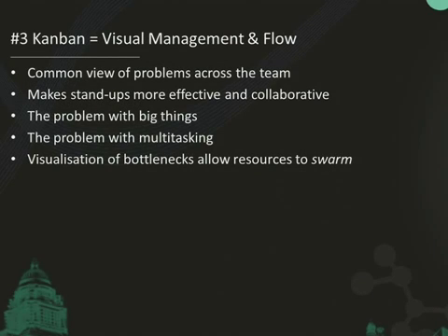So on the flow end of things with Kanban, you limit the work in progress. You focus on shipping small things end to end through your process. That might not be into production, but it might be the nearly there bit, the pre-production environment. The reason is that big things are complex: big bits of work, large features, 50 user stories in development. When they finish them, they hand it off to test, and they're hard to test.